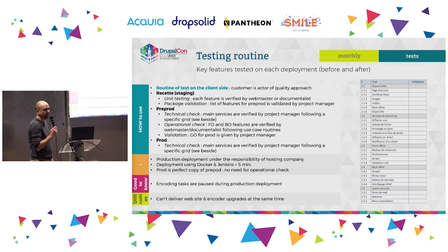Okay, so first I would say that at Can Lille, as a customer, we believe that we have to take a very active part in the quality approach. Our testing team is composed of three people: one documentalist, one webmaster, and me. First of all, each unit delivery is tested by my two colleagues, and they work with access until each feature corresponds to the requirements. After they have validated all the tickets, I check and validate the package of features to be deployed on pre-production.